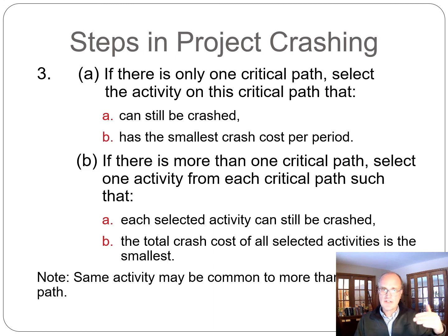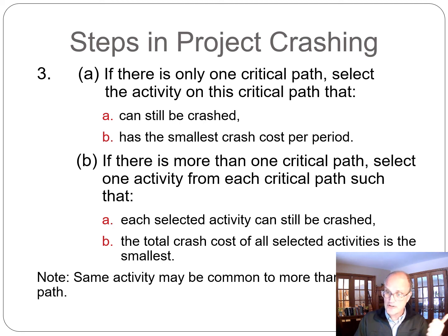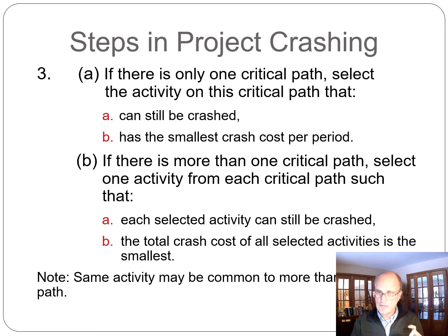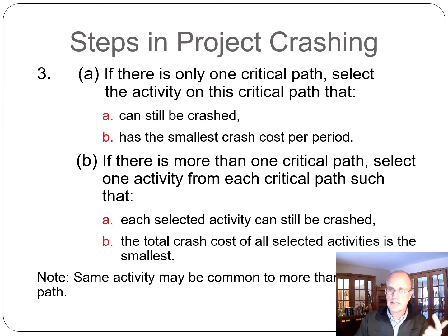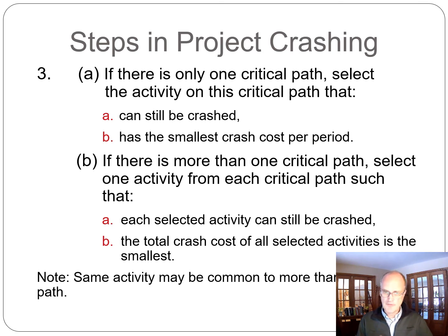So the next step: if there is only one critical path, select the activity on that critical path that can actually be crashed — that's the first criterion. The second criterion is that it has the smallest crash cost per period. Usually you do one period at a time to evaluate whether something else becomes critical. If it's one critical path, pick the cheapest activity you can crash and crash it by one unit of time.